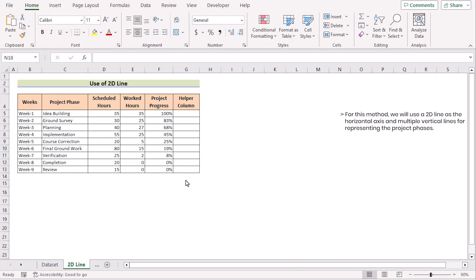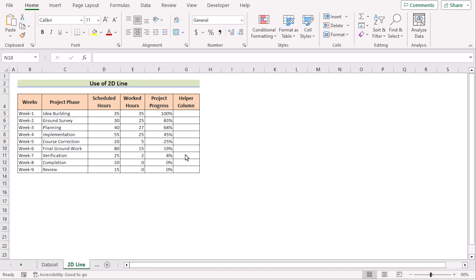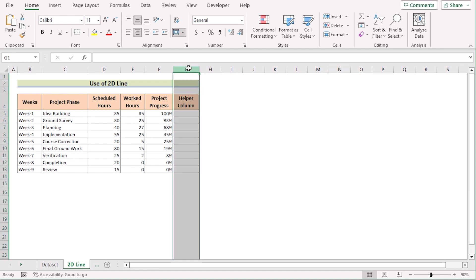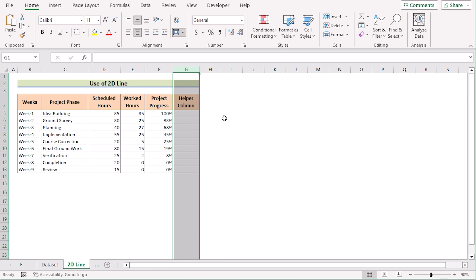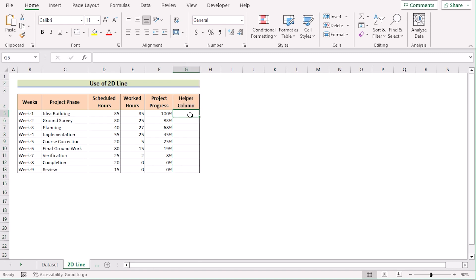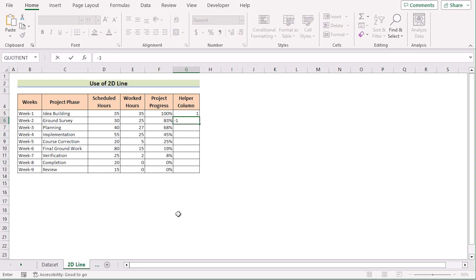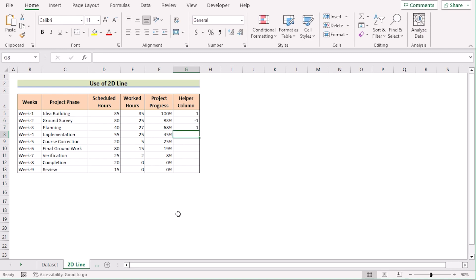In our first method, we want to use a 2D line chart to create a timeline chart. To do that, we need an extra column in column G called the helper column. In the helper column, we can only enter two types of data — 1 and minus 1 — to make the timeline chart visually more attractive. We will go to cell G5, enter 1, then alternate with minus 1 for the remaining cells.